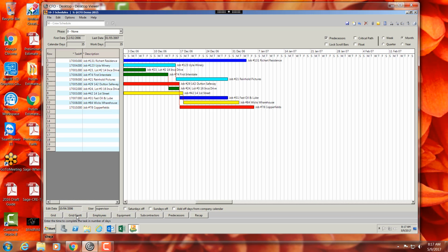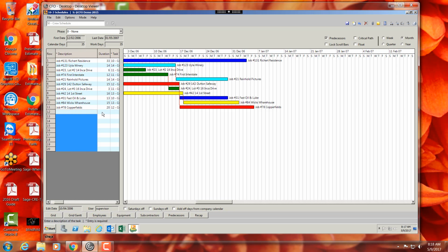And what I get is a Gantt chart that's not your typical one, but it basically just says, hey, the turquoise crew, which I think is crew 2, is going to be on this job, and when they're done with that job, it looks like they're going to just jump over to this job. The green crew's kind of working 2 jobs simultaneously. We split the crew, but when they're done, they're going to jump over onto this job. So I look at this, I can assign crews to jobs, and as I'm getting new jobs, I just keep adding them to the bottom, taking the old ones off.